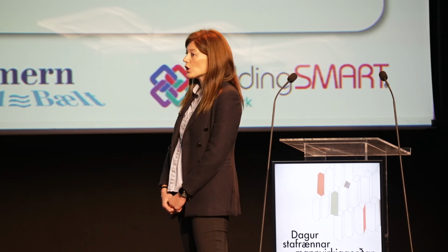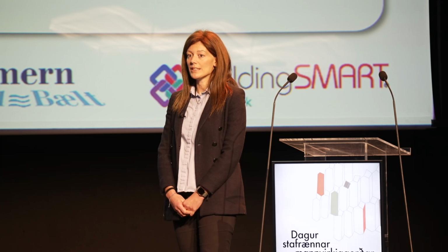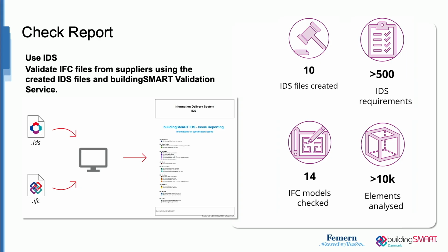In order to check the IDS tool itself, we provided from Fehmarn 14 IFC 4.3 Addendum 2 models to Building Smart Denmark and Building Smart International that through the IDS were able to check more than 10,000 elements.